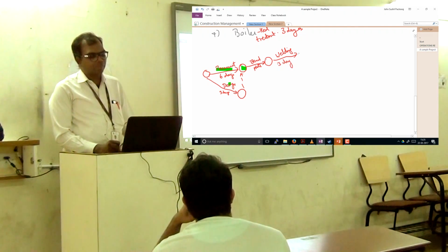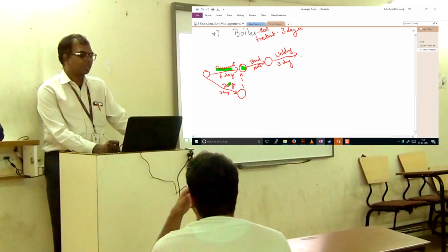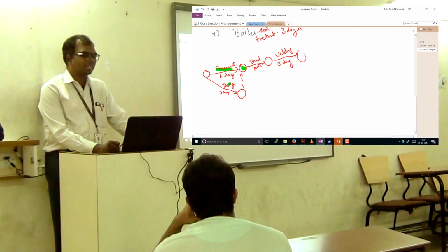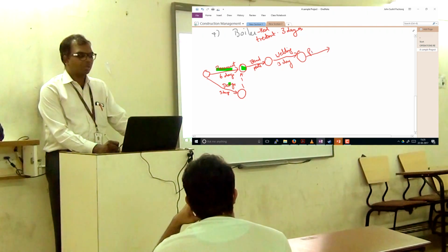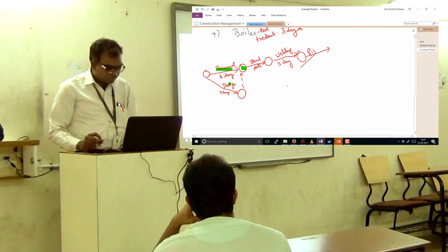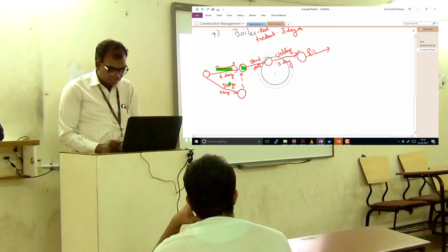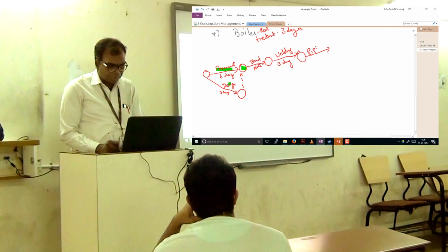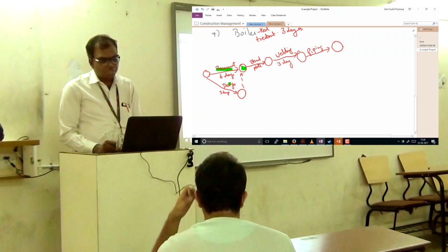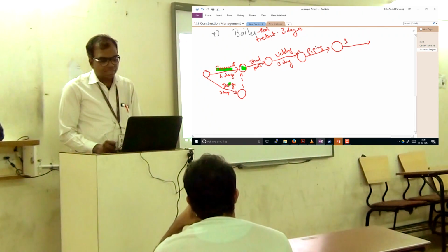And about instrumentation, I know I cannot do it before the piping is done. So probably after welding is done, I go in for the piping for this particular boiler. So I put piping over here, and after this I have got the instrumentation.